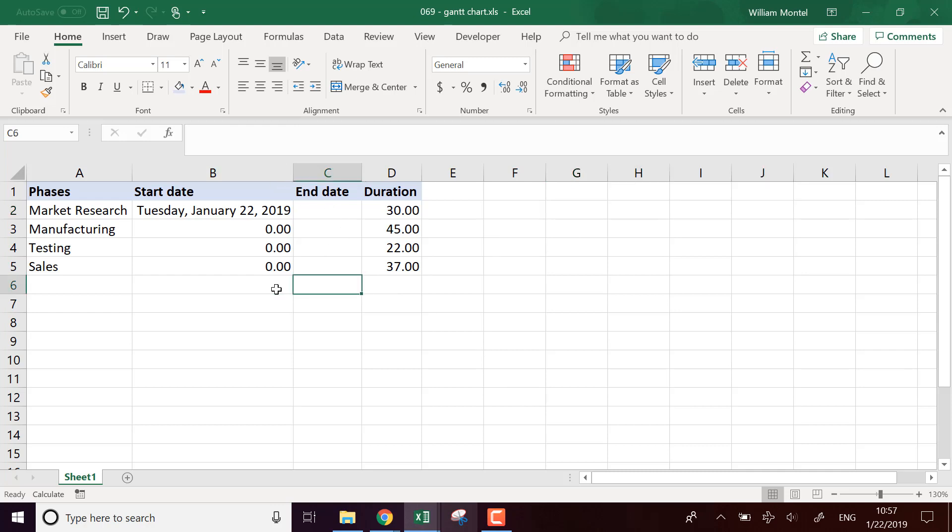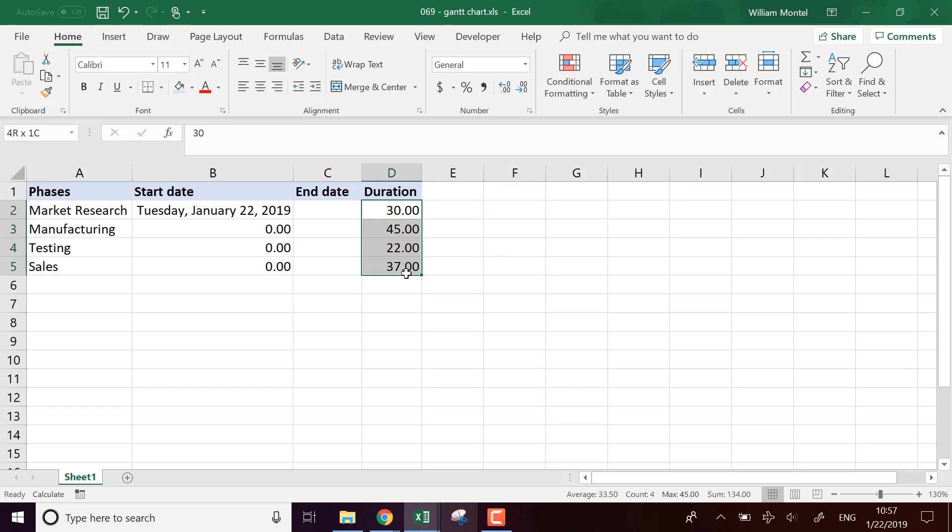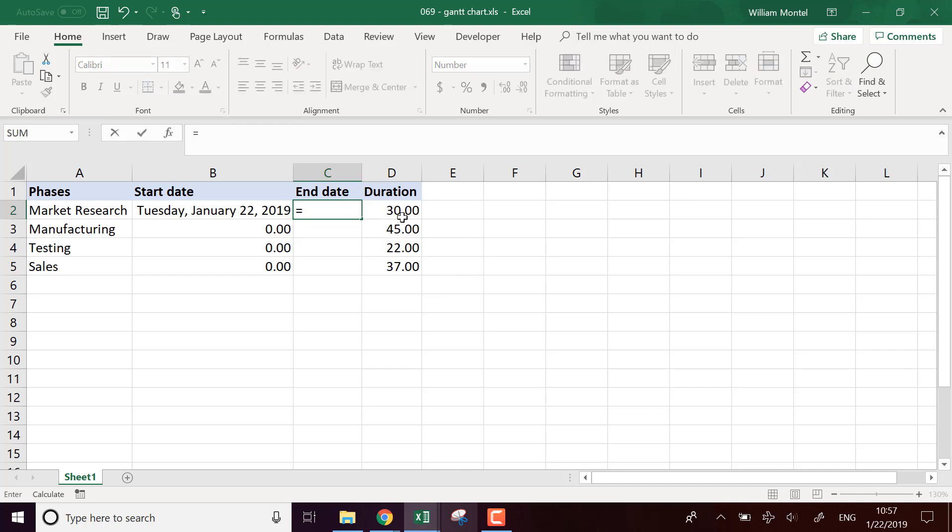And I'm going to show you right away how it's built. So what I need for each phase, I need the start date, the end date and the duration. I'm going to say that I know the duration and I want to compute the end date. So each time I'm just going to put the start date plus the duration.